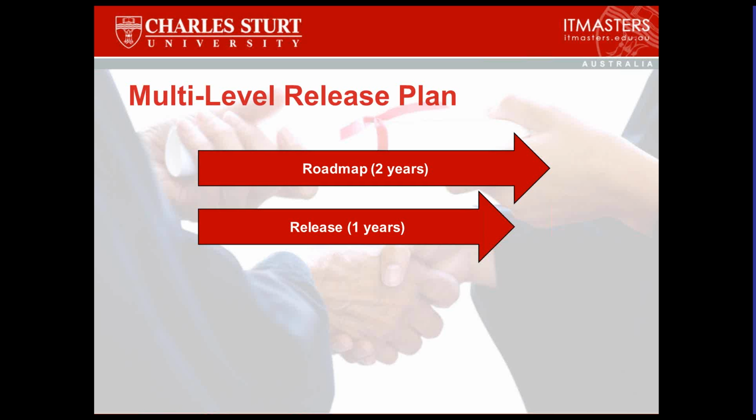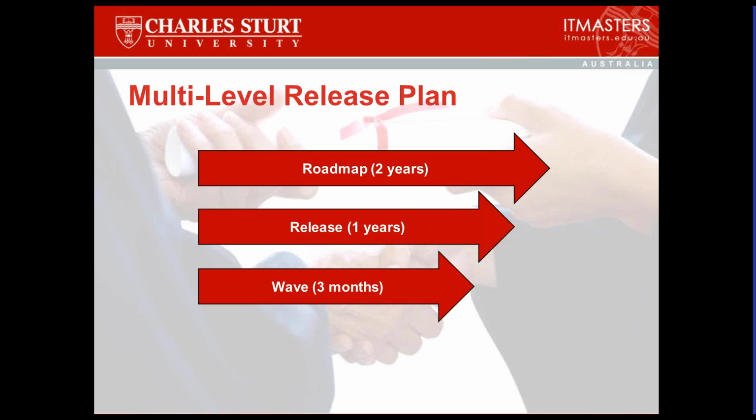Now we're going to work on your data, your distribution and warehousing software that dovetails into that perhaps. And the roadmap might include both of these. But then we look at waves, and this is the really interesting part for me. Waves are really quite important. They're a bit new and novel compared to other types of methodologies. A wave is where you have a number of iterations designed to achieve and accomplish functionality that you can tie up and say, there's an epic that's done. So epics and waves are intended to line up in our release planning.